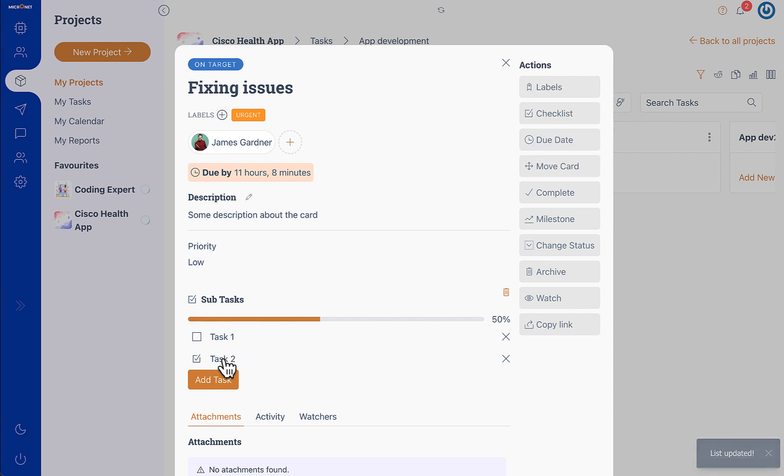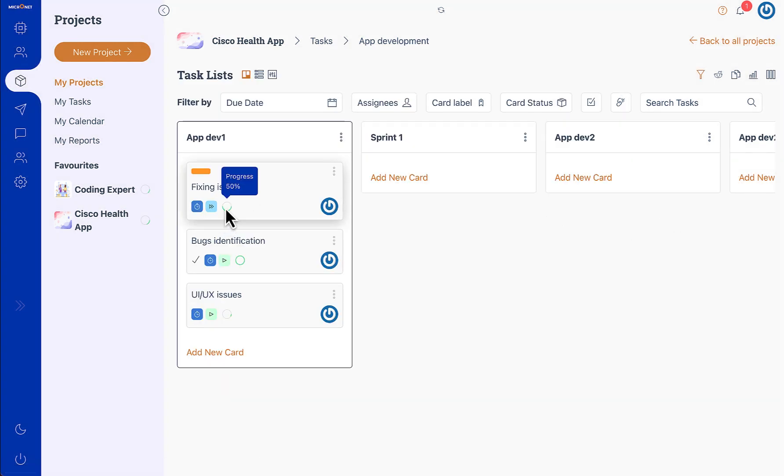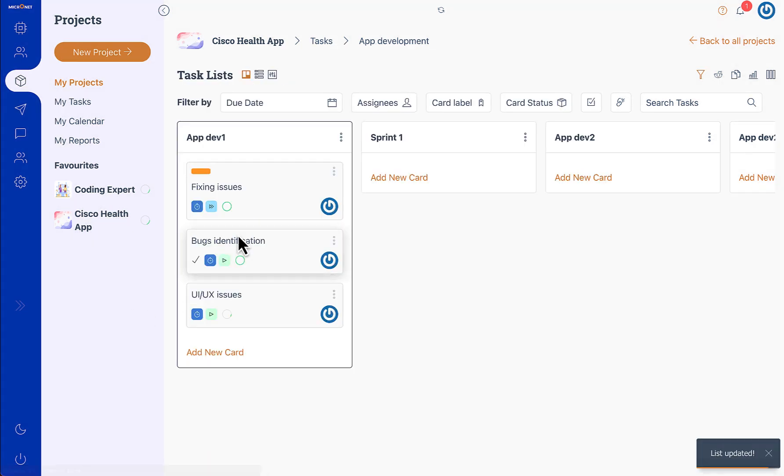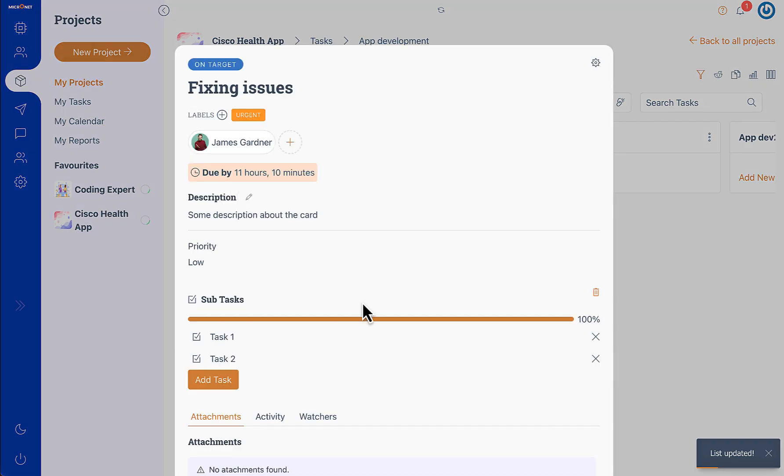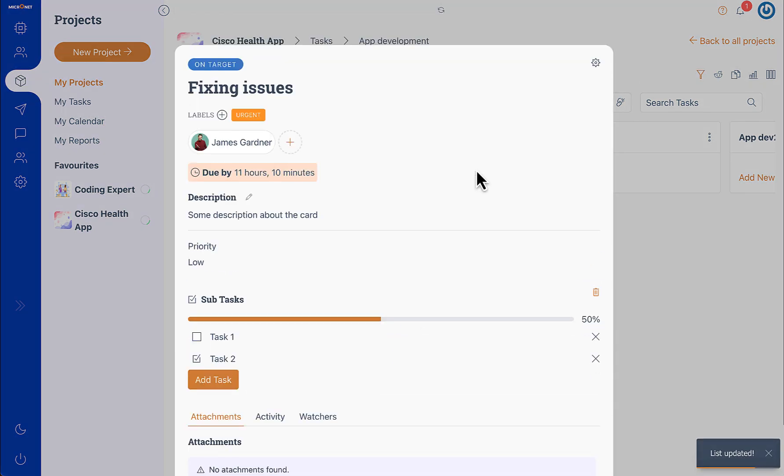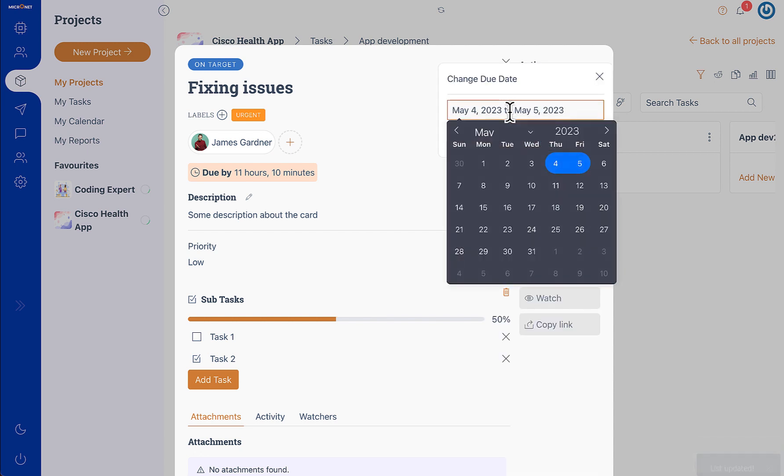The completion of the checklist is actually the progress of the task. So if we close it you can see that we have this progress at 50%, and if we complete this you'll see that we have the progress at 100%.